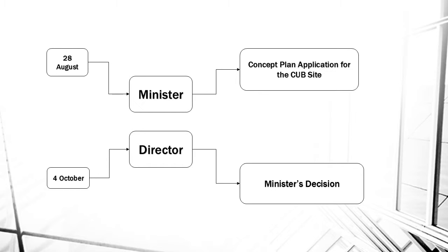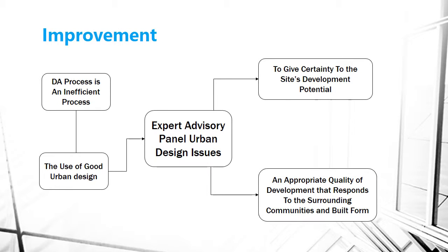Besides, despite the success of planning and the DA approval, something must be taken into consideration from the view of a site stakeholder group. First of all, the DA process is actually an inefficient process which took almost 4 years to achieve all the approvals.